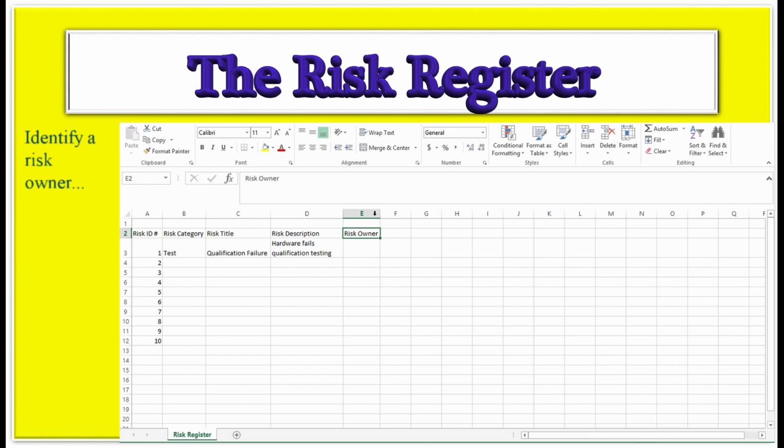So to do that, you create the accountability by having people submit their estimates and take ownership of specific risks. And so in this case, because it's a test risk, we're going to have the test lead take ownership of this. The reason is they say, yes, I will take responsibility for this. Now they've created a sense of accountability on their part to make sure that this doesn't become an issue. The person we're going to put here is James DeWitt, the test lead. Just going to extend that field.